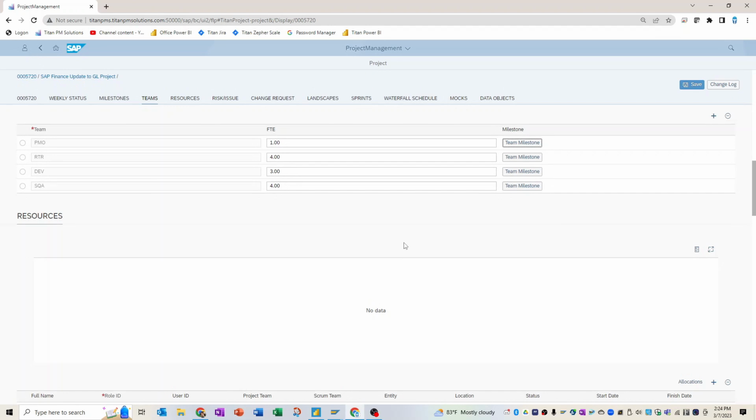And what you can do also, again, from a configuration perspective: what happens with a lot of teams is they're not engaged from the beginning like they're engaged at the end. A classic example here is our testing team, which is probably not as engaged at the beginning of the project, and they can go with pretty light associations at the beginning. Say 10% of the group is what we have them configured for.